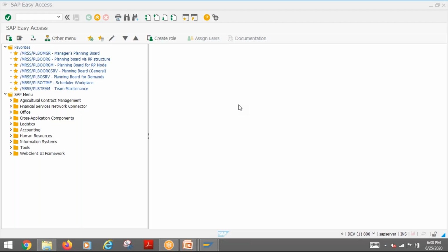Similarly, we have seen how to do the unit costing. Then we have seen that when a material is attached, that cost is rolled up. And also we have seen the costing sheet. Due to the costing sheet, some additional overheads are calculated for each and every cost or activity, wherever it is. So these are the things relevant for network costing.